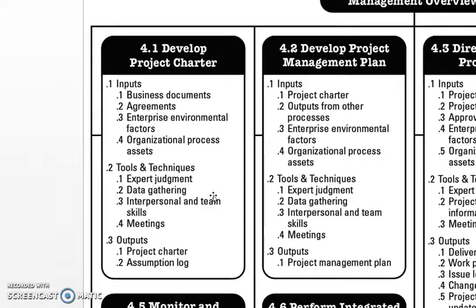The output of this process is the project management plan. Here we are developing the entire project management plan in this section. But as you execute the project, a lot of changes may come, and this project management plan will be updated iteratively until the project is over.